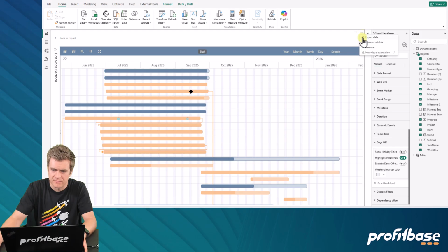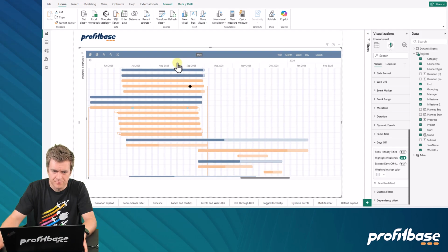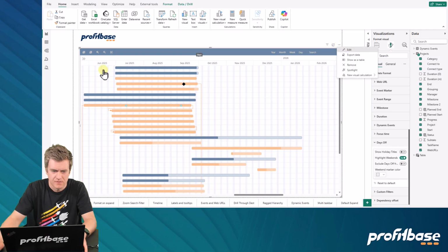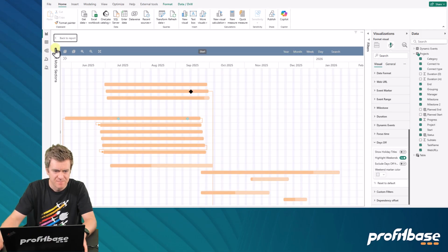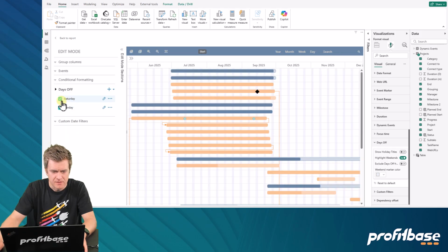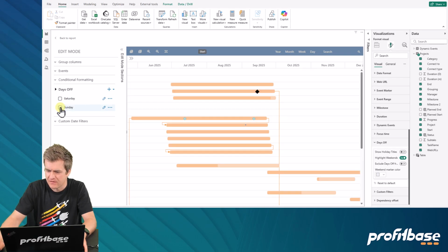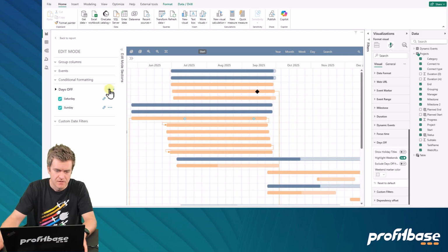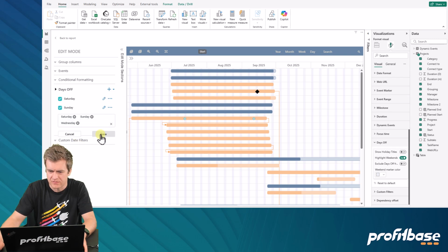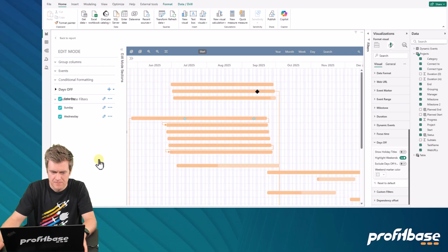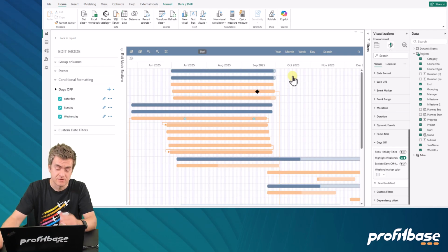And if you go back to, oops, sorry. Oh, we were in mode, sorry. Here is edit mode. If I unselect one of these, you see it's only one day showing as a holiday or as a weekend. I can add new days that should be days off. So I can say Wednesday should also be a day off. The Wednesday is added to the list and added to the grid.